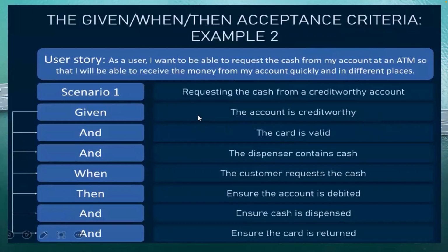Given that I am an admin with access, when the gender option has been defined, then it stays at any of the available options and should not go back undefined. Now, that's acceptance criteria 2. Acceptance criteria 3 says, given that I am an admin with access, when I select a preferred option, then I should be able to save the selected option.